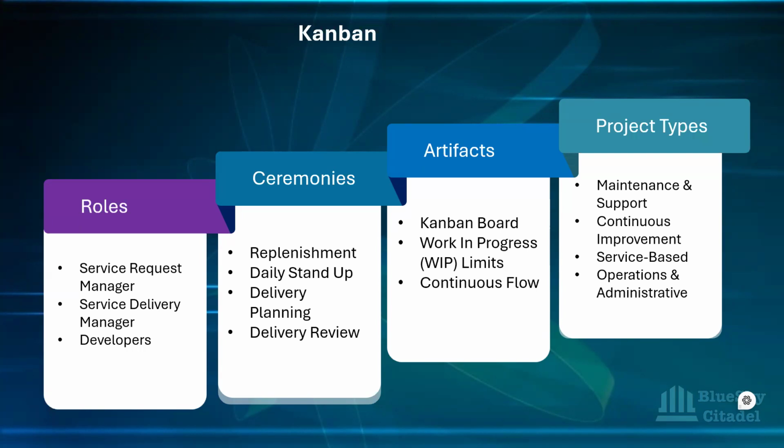And what that is saying is at least every team member has one story they're working on. And what that means is that until this person's story moves into the next column, that person doesn't go and pick another story from the ready column in order to work on. So they have to finish it, move it on maybe to the testers to test, and that is when that person can go and pick another one to work on.